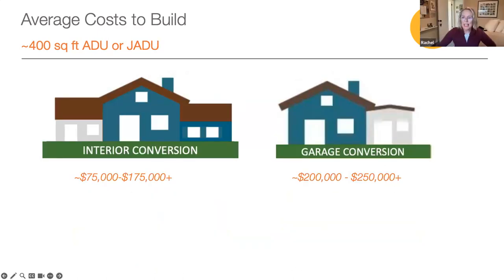Interior conversions are more economical because they save on material costs for exterior walls and sometimes interior finishes such as drywall, trim, and flooring. But integrating with the existing structure can also add costs to the design and construction process. In this case, we have included a rough estimate for a 400 square foot unit — the size of a typical two-car garage.